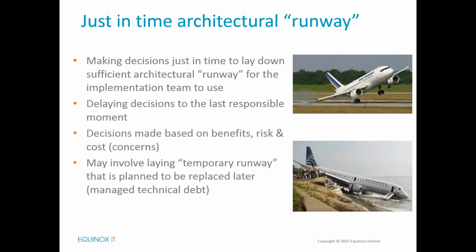Okay, there's also this concept, which you often hear in Agile, of laying down what they call architectural runway. So basically making decisions just in time to lay down sufficient architectural runway for the implementation to land on, to use. You're laying it down to the last responsible moment, the key word there being responsible. So not necessarily the very last moment, but the last responsible moment.